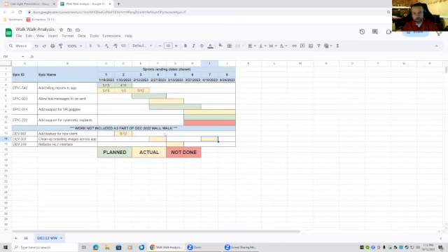You can make this spreadsheet as detailed or as complicated as you want it to be. And you can tailor it. Y'all know your leadership and your stakeholders certainly better than I ever will. So you know how they work, how they read stuff. You can modify this to be more meaningful to them. But at its base, it's just a simple Gantt chart. And I did this in Google Sheets because, working for a startup, we don't have a lot of expensive tools. I can't get Project. Not sure they'd want to look at a big project plan anyway. And you can update this, not necessarily after every sprint, but let's say you have a monthly meeting with senior leadership, update it before every monthly meeting.